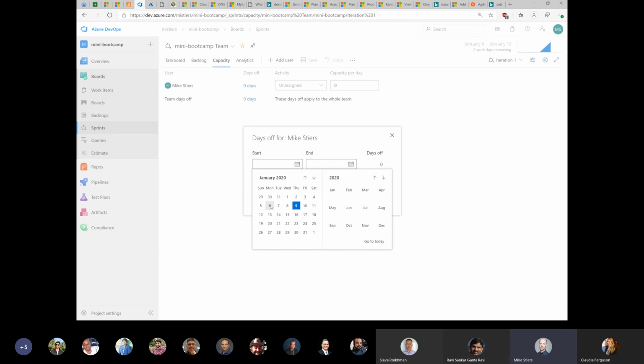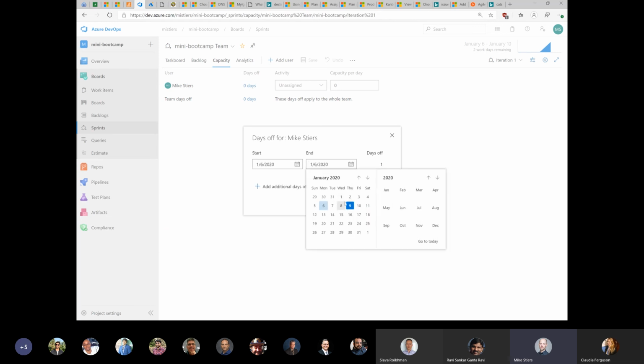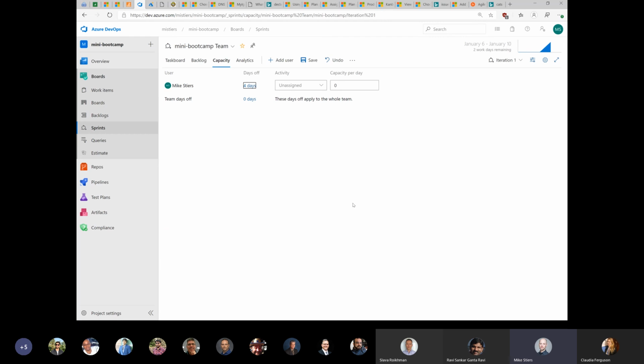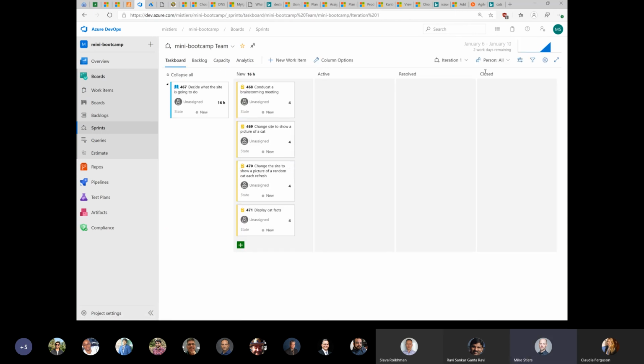So I'm going to say that I'm off for the 5 days. So we have, what was it, 16 hours, and I am only available for 8 of those. So it's a good way to track the capacity of your overall team, but we only have one person here. So let's assign them to me and see what happens.